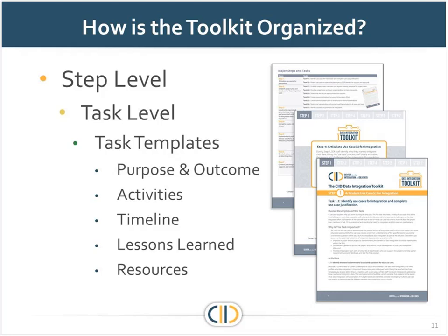And we've developed what we're calling task templates. They're 2 to 3 page documents that make it easy to understand the purpose and outcome that would come as a result of completing this task, the specific activities within that task that you would typically need to complete, and then, as I mentioned earlier, the timeline, as well as staffing requirements that likely would be needed within your state. And then also trying to provide, as I again mentioned before, the lessons learned or resources, or examples that come from your colleagues who have already done this work previously.